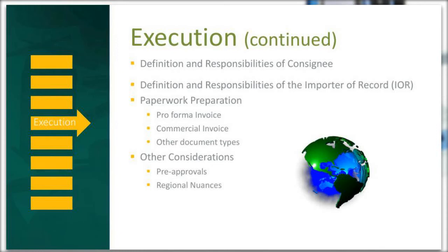Best practice is to ensure in advance that everyone involved in your supply chain knows what ancillary supplies are expected to arrive in country and in the most efficient time period. It's important to know the export rules before importing. Know restrictions about returns and destructions of your ancillary supplies, which differ amongst countries.